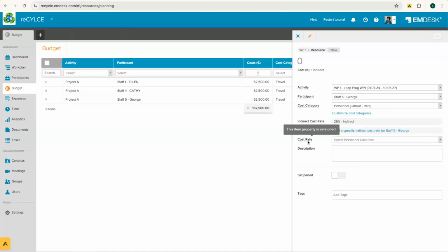And now you see cost rate has been entered. I can select either George Pitt for the rate that I have created. So I can do, for example, 1 person month will be for work package 1, for example. If I change it, it'll automatically be adjusted, 16,000 and so on, 24. This will automatically be adjusted.